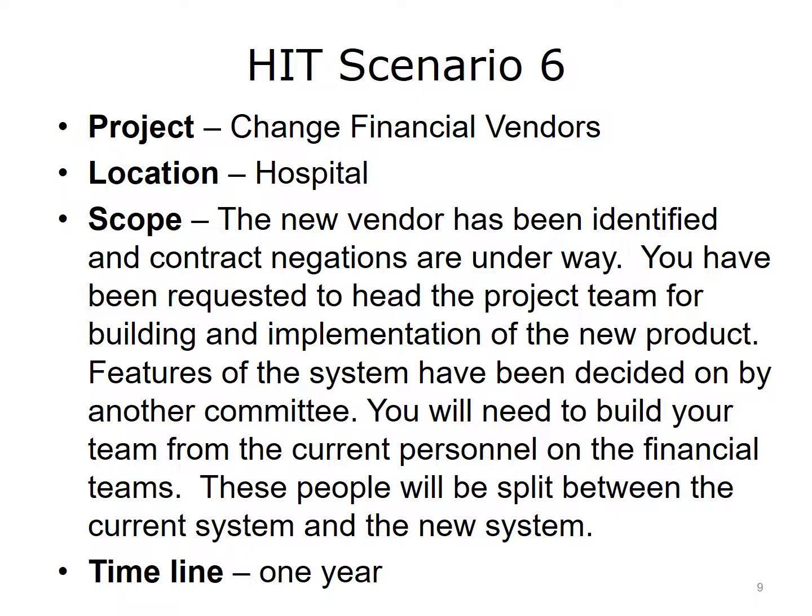Most of your conversations will be with the administrative staff, so the only clinical input you may need would be from those working in labs, the radiology department, or the pharmacy system. Integration between healthcare IT systems or vendors can become extremely complicated because you have various computers and networks trying to communicate with each other. So you'll also have to arrange meetings with interface analysts to make sure that information is flowing smoothly among all the vendors.